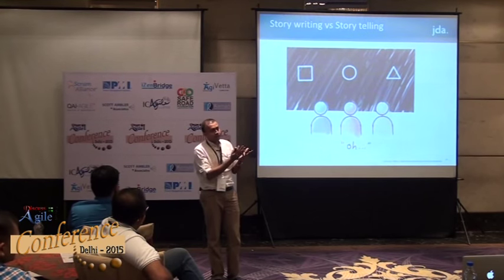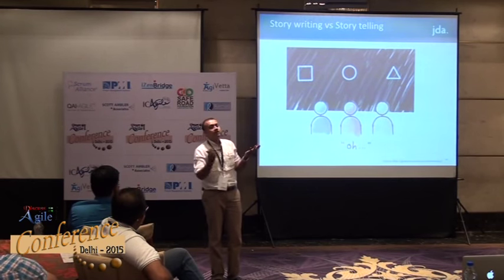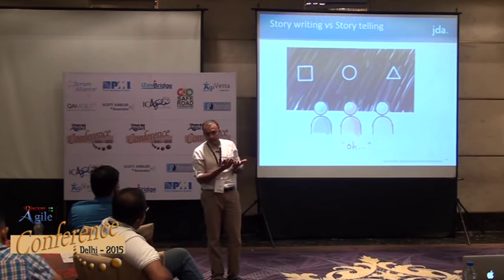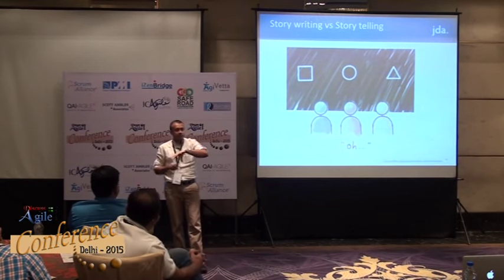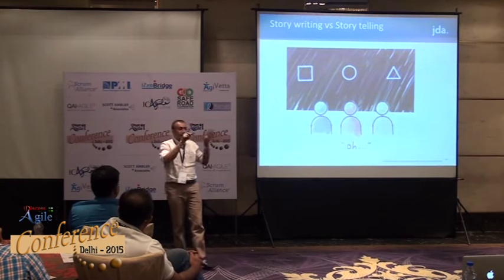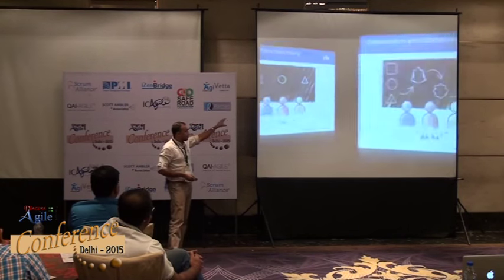Then you do a product discovery. You have the conversation, you shape it up, then involve the team. Get their ideas. They're going to talk about some technical limitations, they're going to ask about performance limitations, they're going to give you a lot of ideas. So you work around that and create a common understanding about how it is going to be.